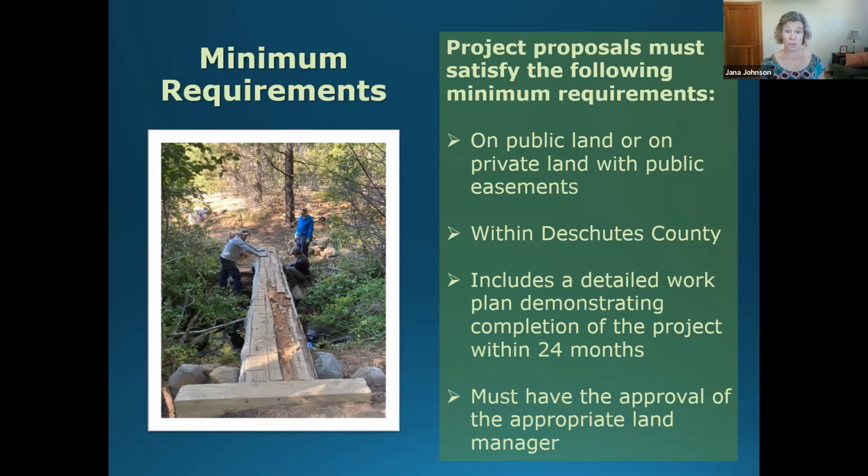For a minimum requirement, we'd like to have a detailed work plan demonstrating completion of a project within 24 months. Like I said, if these are larger value projects, they probably have some complexity. And so we want to see that you've thought through all the parts and pieces that are part of that project, and that it fits within a 24-month timeline to complete.